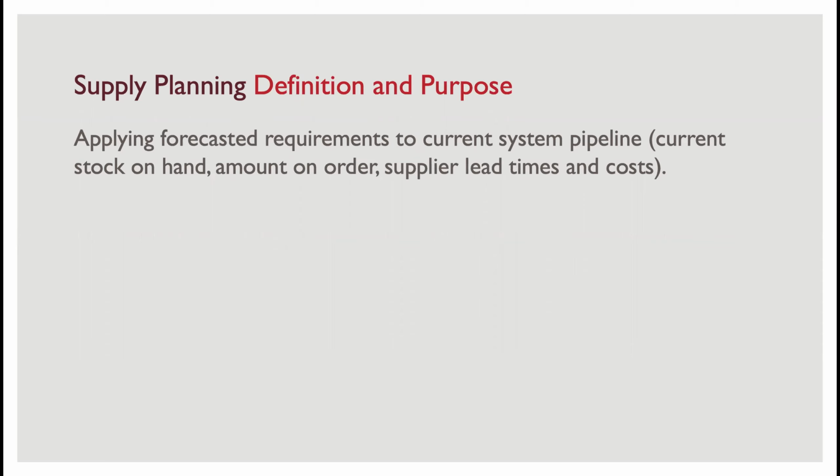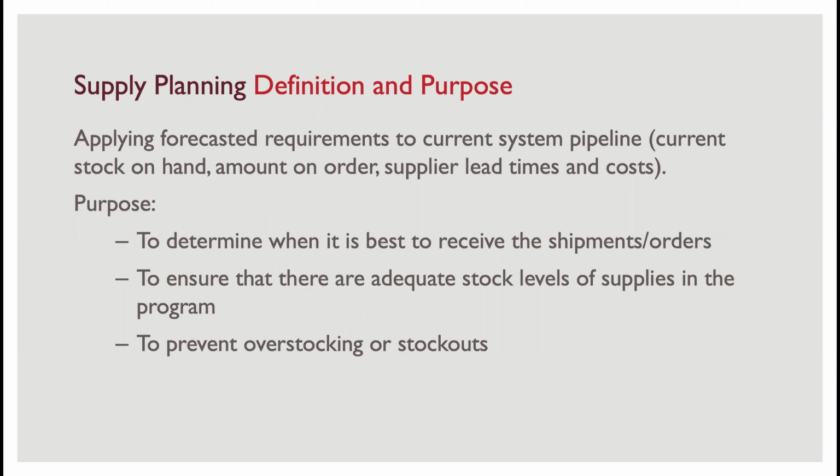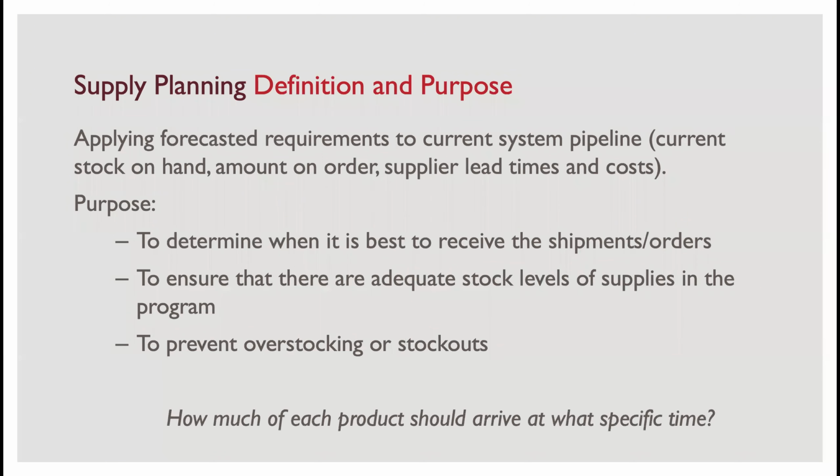So with that in mind, the purpose of our supply plan will be to determine when it is best to receive shipments and orders, to ensure that there are adequate stock levels of supplies in the pipeline or in the program, and to prevent overstocking and stockouts. Essentially, the supply plan will help us answer this critical question: how much of each product should arrive and at what specific time?